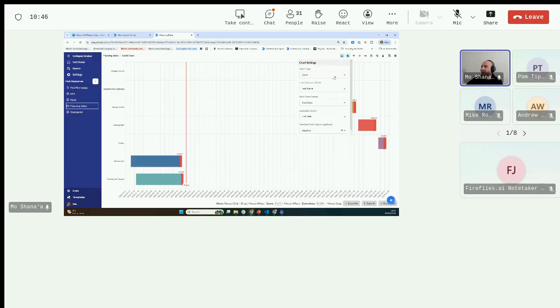I can do that now because we've introduced this concept where the actual end date could be the end date column, and then there's a deadline column, which is where the red effectively starts. So you can see these specific improvements that are also happening in chart views off the back of feedback that we're getting from you.